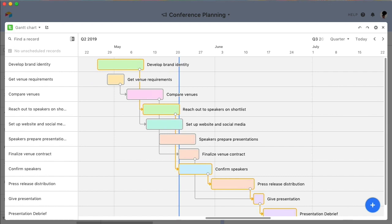You'll notice that some dependencies may be outlined in gold. This golden line is called the critical path, which is the longest path that ends in the item with the last end date. Essentially, if anything on this path is altered, it'll affect the overall end date for the entire project. The critical path is here to help you make informed decisions when moving around dates on your Gantt chart.